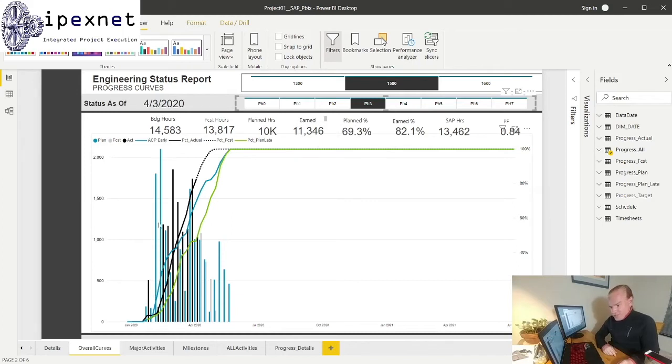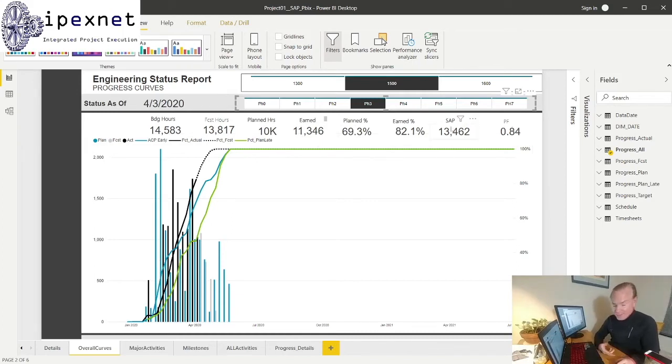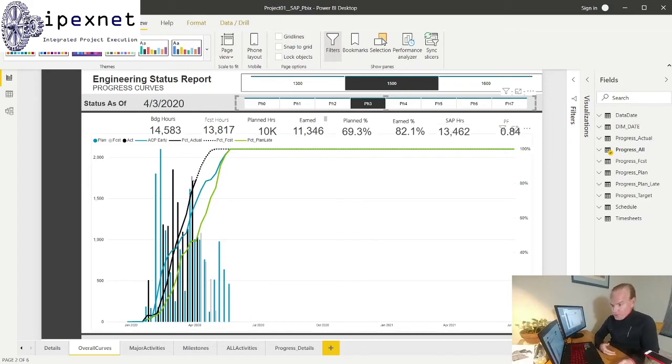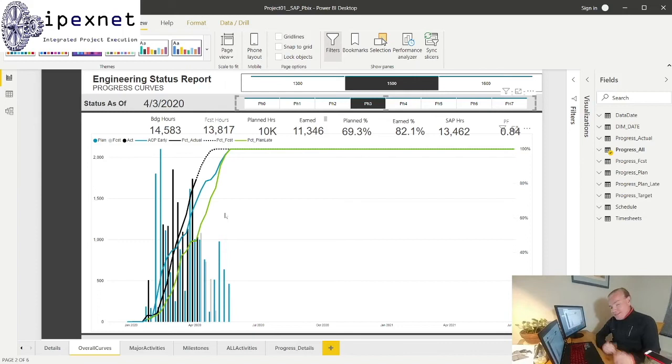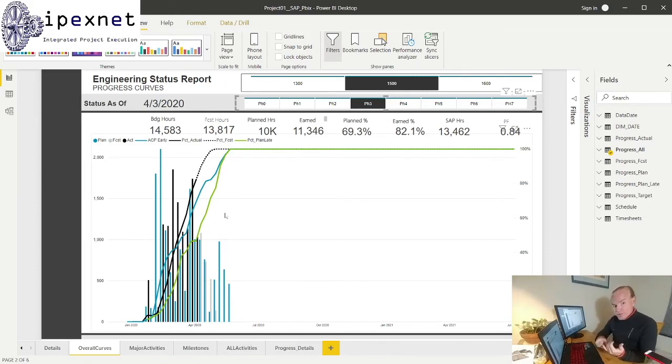I've not done it on this dashboard, but you can actually insert a histogram to see the weekly spent hours. It's actually pretty easy to do. Here the black bars are the histogram of my earn, and I'm comparing my earned against my plan. And the little light gray ones are my forecast.